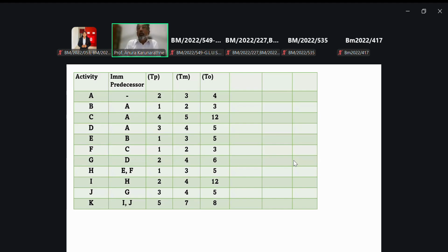I think you are given enough time to complete it, right? Right. We can work on this task. Here, we have got the expected time. So how to do it? Multiply this by 4 times. Here 1 time, here 1 time. Then take the total, then divide this by 6. That is the expected time.